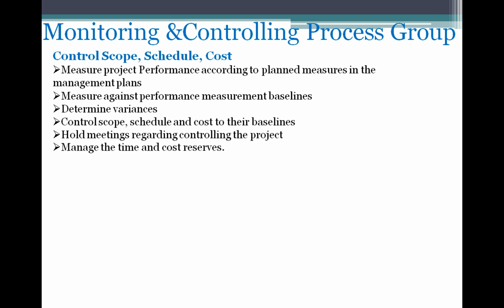When there is a cost variance, if it is a small variance, he manages it within the reserves. The project has management reserves and contingency reserves, so for monitoring and controlling, he allocates the budgets and manages the reserves.